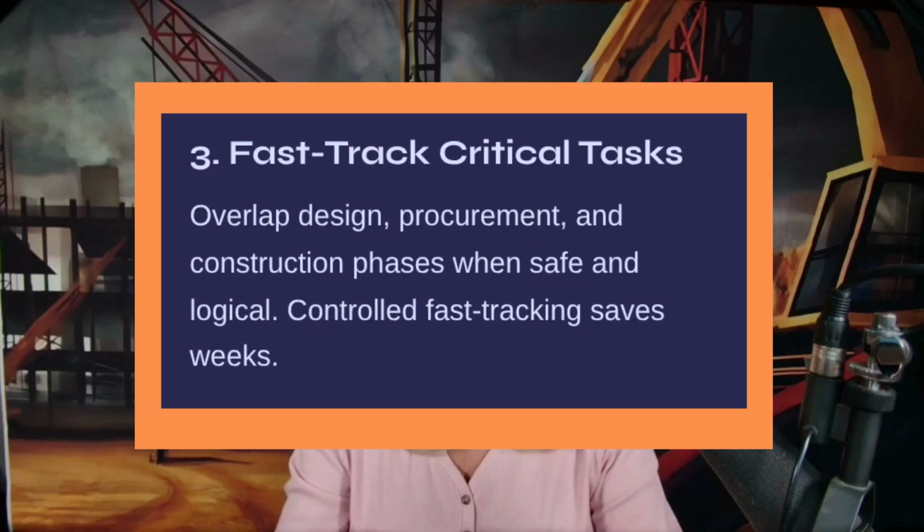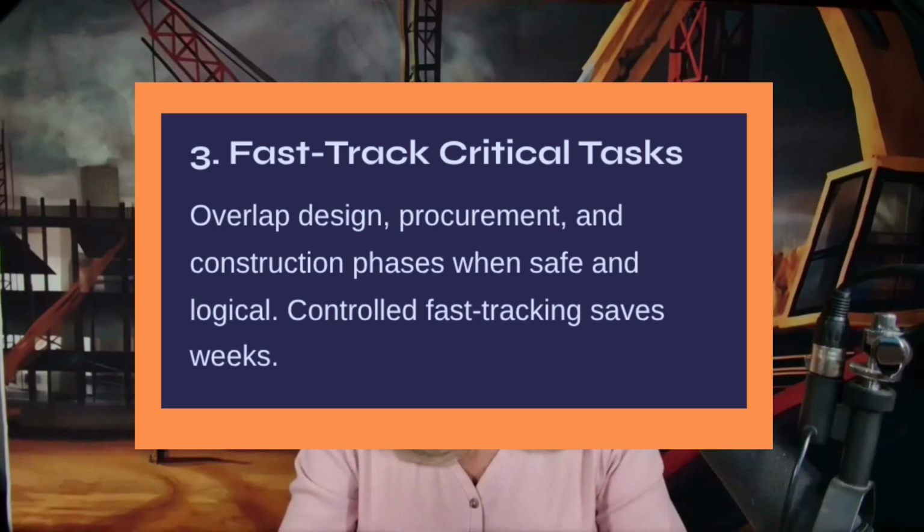Fast track critical tasks. So overlap design, procurement, and construction phases when it's safe and logical. For instance, start rough-in before all finishes are finalized if you know the layout won't change. Controlled fast tracking requires experience, but it can save weeks.